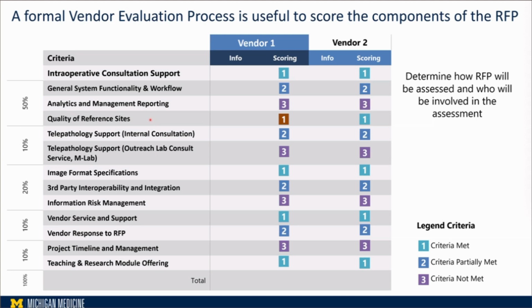This is extremely important. We went, literally, after we had presentations from them, we visited multiple sites that those vendors already provide clinical workflow for, or even we reached out to them remotely. Things that we also did, we visited some headquarters of those vendors as well. We asked, for example, from digital pathology, what format they can provide, whether they have third-party interoperability and integration. We also asked what their support is, how they respond to the RFP.